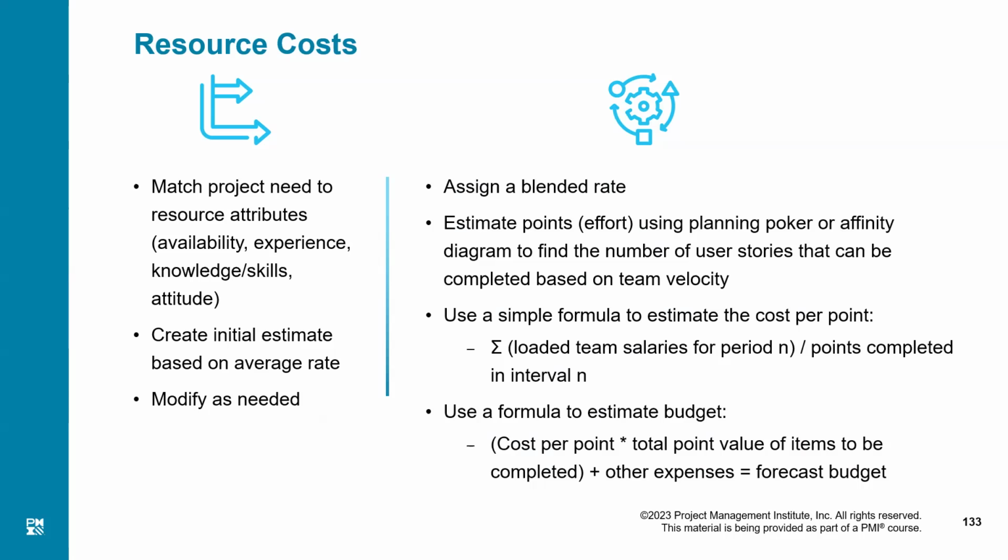So now when we are picking up the work, first of all, user stories should be small enough. No story would be 10,000 story points. The story points would be something ranging between 1 to 300 or 400, right? So the team will go to the product backlog. They say, we think we can accomplish, say, 700 story points in one iteration.